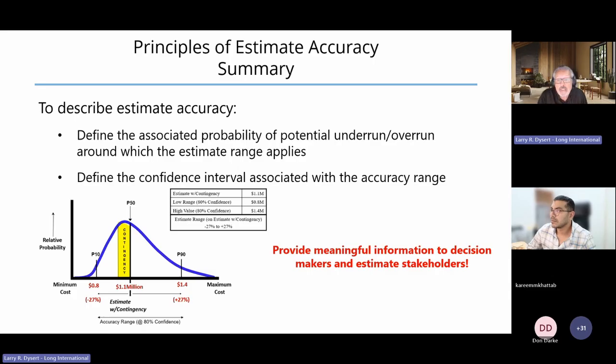So it's partly a case of understanding how to use quantitative risk analysis tools effectively. That typically means out of the thousands of things that may appear on a risk register, or the thousands of elements individually within our estimate, we're only looking at the key defining ones.